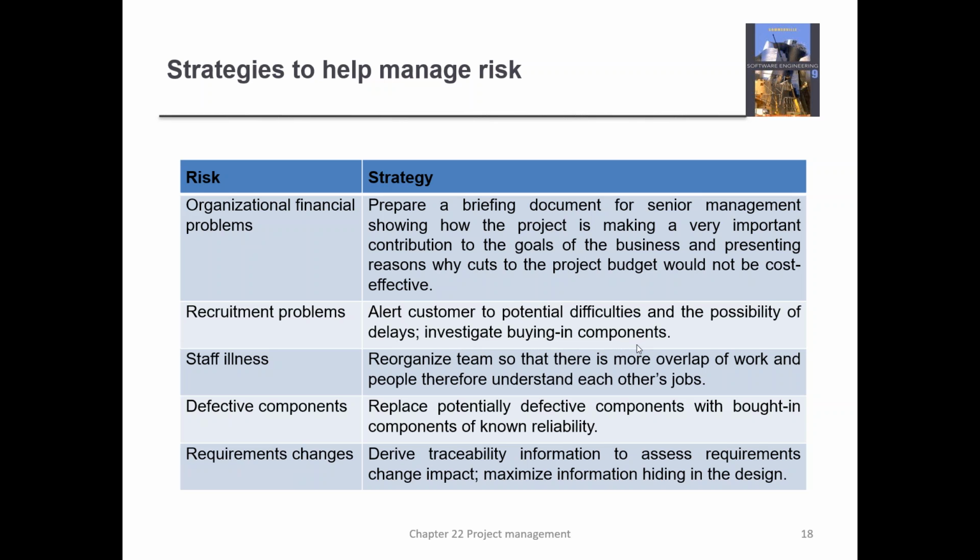Instead of going the straight programming route, you look at moving to reuse or component-based software development, looking at components that you can buy in and modify instead of having somebody come and write that code from scratch. But regardless, you let your client know, because if there's a project time overrun, then you, the designer, are going to have to pay for it.